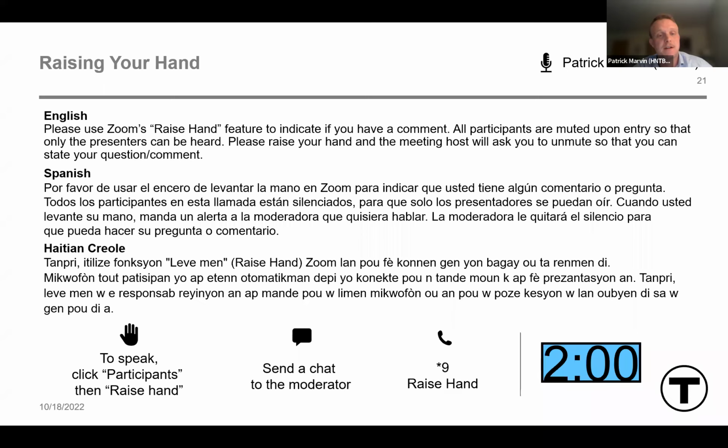Great. And then the final chat question is, what is the cost of this project? And where is the money coming from to cover the cost? AJ, you want to take that one? Yeah, sorry. So to answer the first question, the total cost of the program, we don't have an official total cost estimate at this time. That will be completed as part of the 15% design submission by the end of 2023.